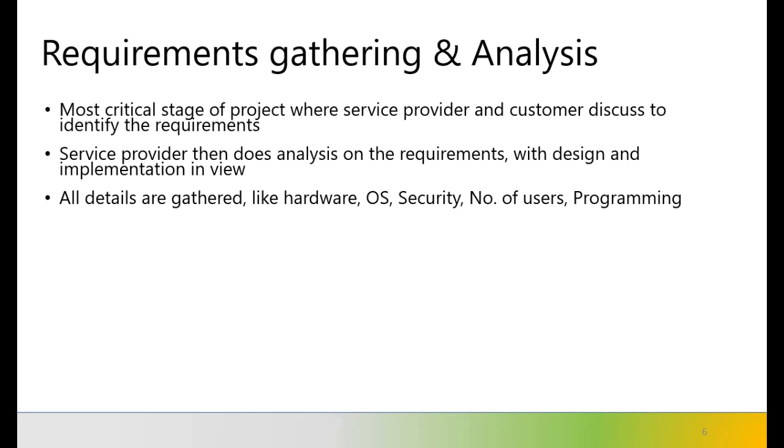Here you also try to gather every minute detail, like what is the hardware that the application is going to run on, what are the OS requirements, what is the security requirements, what's going to be the number of users for the application, what's the programming that needs to be used, are we going to develop it inside a microservices architecture, anything of such sorts.